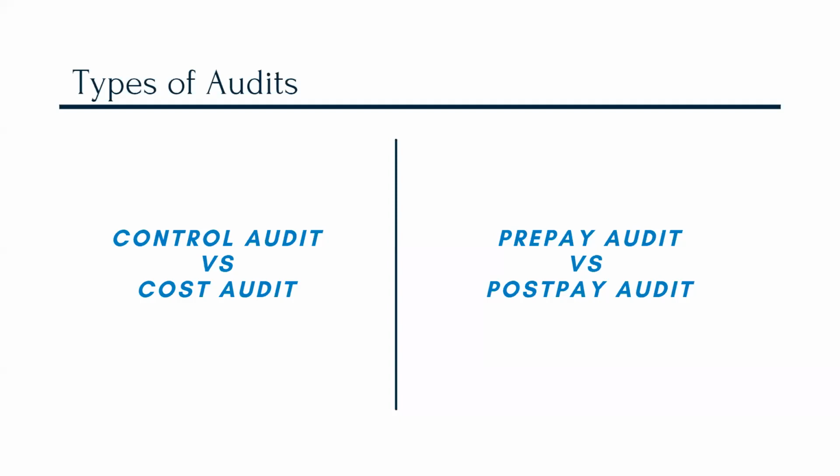And there are some benefits to doing those audits, especially in construction. It's often difficult to recover money after it's changed hands. In the context of an owner auditing a project and the pay applications from a general contractor, one of the challenges is recovering those costs after they've been paid. A general contractor is almost always more willing to adjust pay applications in real time, before the payment rather than after. However, there are times and types of projects where a post-payment audit makes sense.